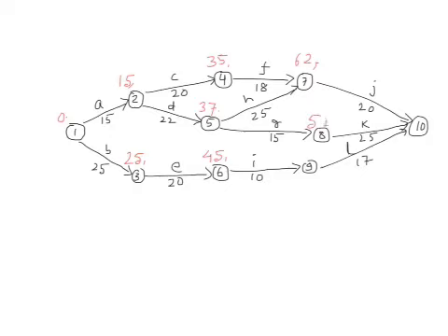Then for node 9 the earliest time is 55, and for node 10 when you calculate it is 62 plus 20, which is 82. 52 plus 25 is 77, and 55 plus 17 is 72.